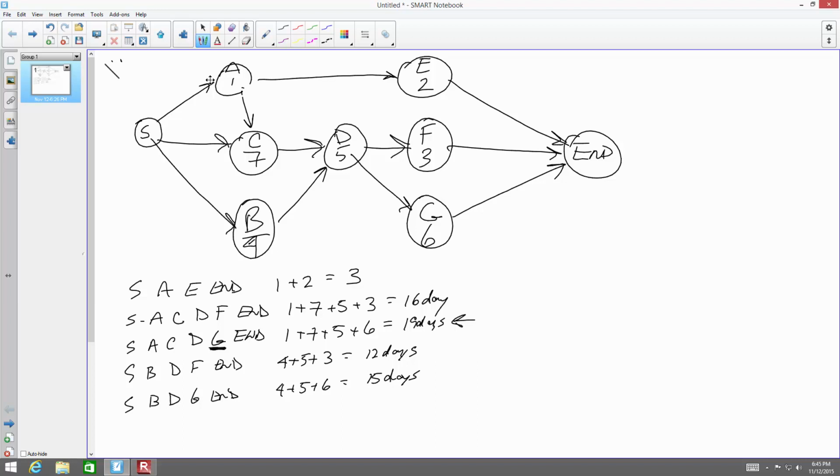And in competitive bidding, when the bids are all opened, the owner will normally award the contract to the lowest available bidder, qualified bidder, responsible bidder, bonded bidder. And this is one of the problems of going back to your construction materials or construction management book and just reading terms and trying to recall what the terms are.